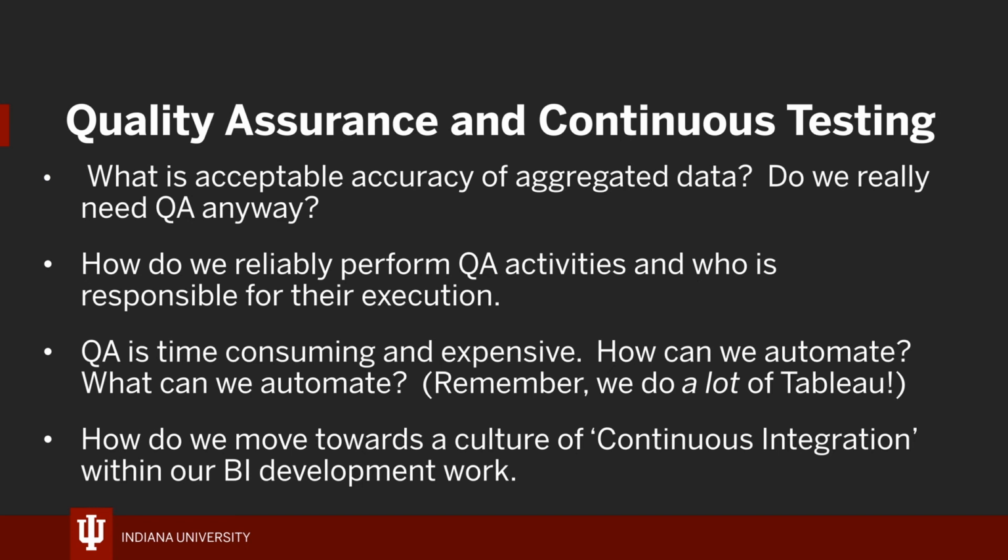One thing we learned in our process that we didn't necessarily plan for well was the impact of quality assurance. So our initial products didn't have as high a quality as was desired, and so we had to develop a much more rigorous QA process. And as many developers will tell you, QA is not necessarily something that is exciting to do, and honestly, it probably consumes the better part of 60 to 65% of our entire development cycle. So we spend probably less time doing true development than we do actually making sure that our work is correct.